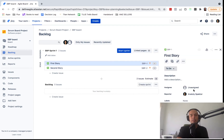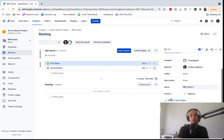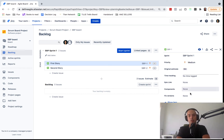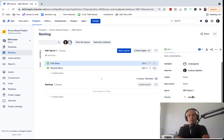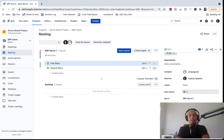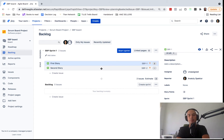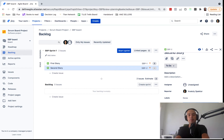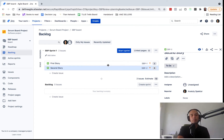Usually in Scrum you also estimate stories — I won't go into estimation in depth here, but you'll assign story points with your team. For example, let's say one story is two story points and another is eight story points. The one with eight is much more complex and will take more time. So now we have two stories with different complexity levels.